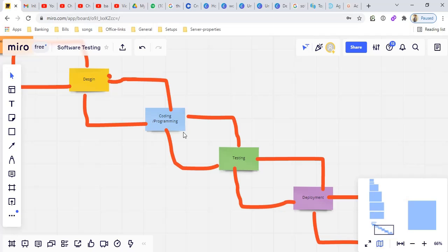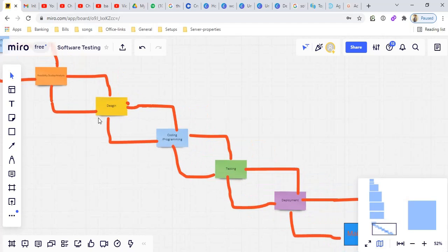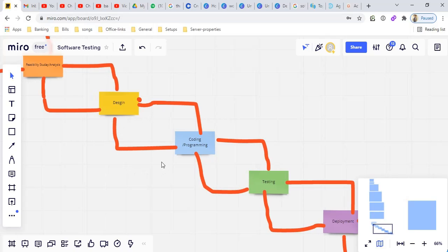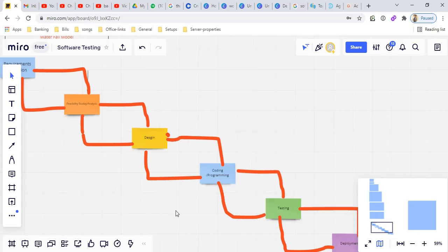Changing requirements once the design stage is reached is a problem. A change in the requirements leads to a change in the design. If the customer changes the requirements, then the development company has to change the design as per the new requirements. That leads to bugs in the design, which leads to changes in the code, which results in more bugs. Basically, frequent changes in the requirements will be a big headache for the design, coding, and testing phases as well. This is the drawback. And the customer may not be satisfied if the changes required are not appropriately reflected in the product. The end result of the waterfall model is not a flexible product.